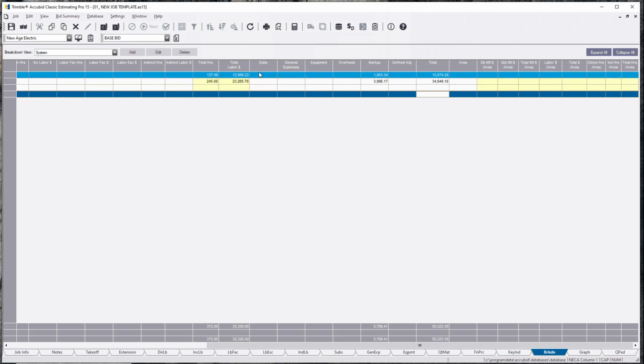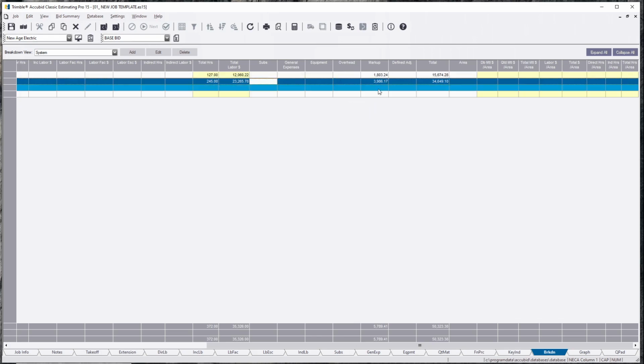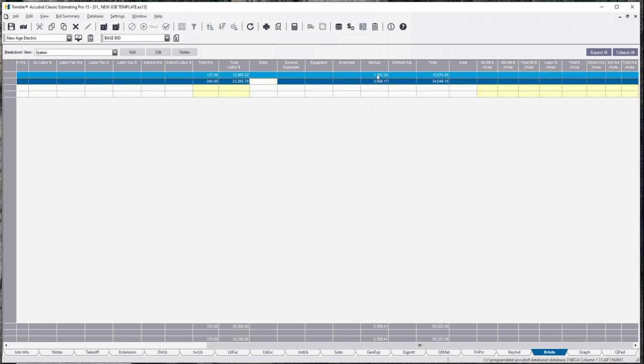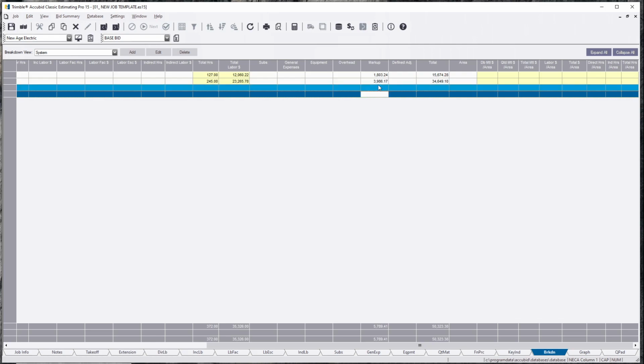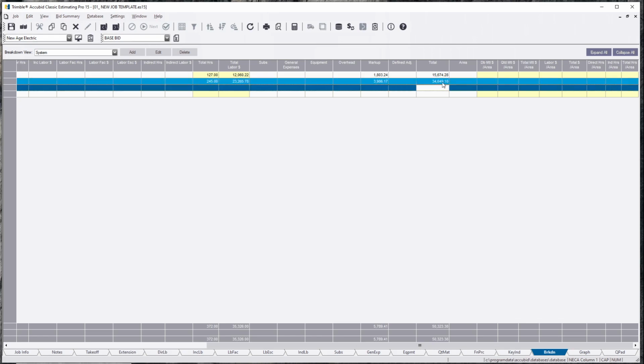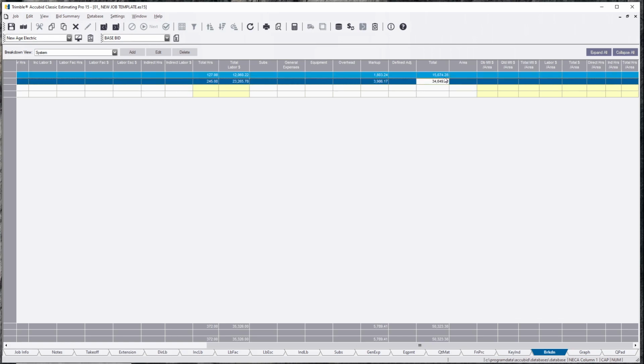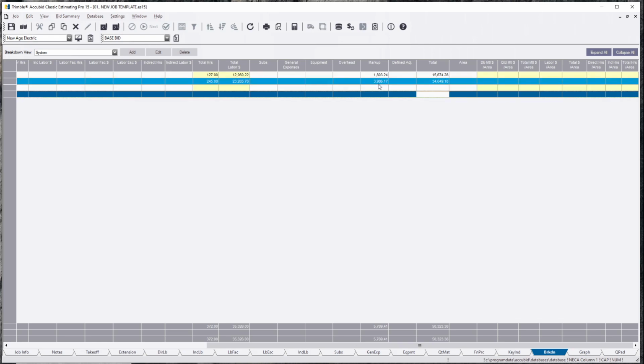And if you did it this way and broke it out, not really understanding that you applied 13% to everything you see here, now you have to give this back. If you told him how much it was, he's probably going to expect a good chunk back, because it was a lot of work and a large chunk of the job, $34,000 versus $15,000. So he's going to expect a decent amount of money back.